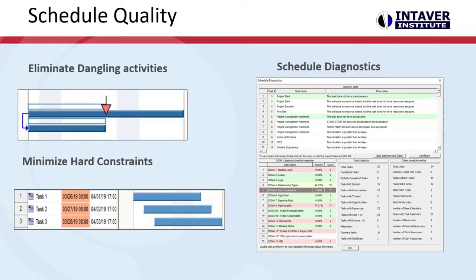The most important items are dangling activities. During a simulation, if you modify the dates or duration of activities that are missing predecessors or successors, with some exceptions, these changes will not be reflected in the results of the simulation, because they're just not pushing or pulling your activities.